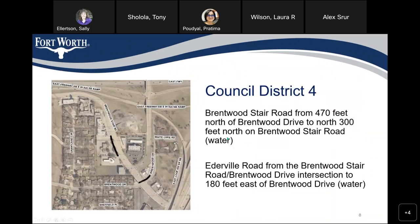There are two other segments in Council District 4. One is a section on Brentwood Stair, starting about 470 feet north from the intersection and extending 300 feet further north. The other section starts here and goes about 180 feet toward the northeast. Both of these are water replacements.